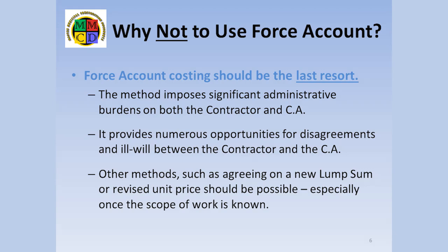It imposes a significant administrative burden on both the contractor and the CA. Both have to track quantities and time for every shift, for every item where there is the potential for additional payment, but where the method has not yet been agreed.